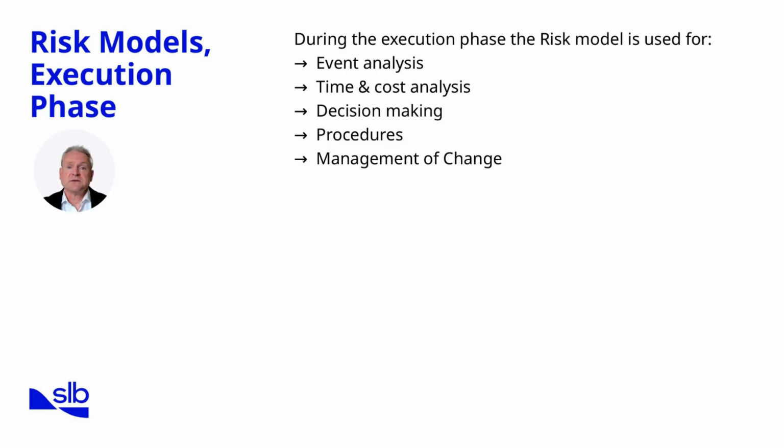Once drilling moves into execution, risk models shift from prediction to real-time application. Instead of defining possible events, we are now analyzing actual events as they unfold. For example, if lost circulation occurs, the model guides us in quantifying its impact on both time and cost.